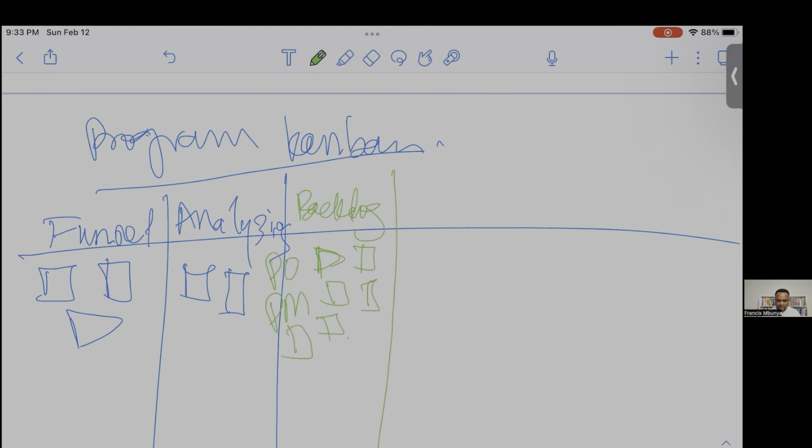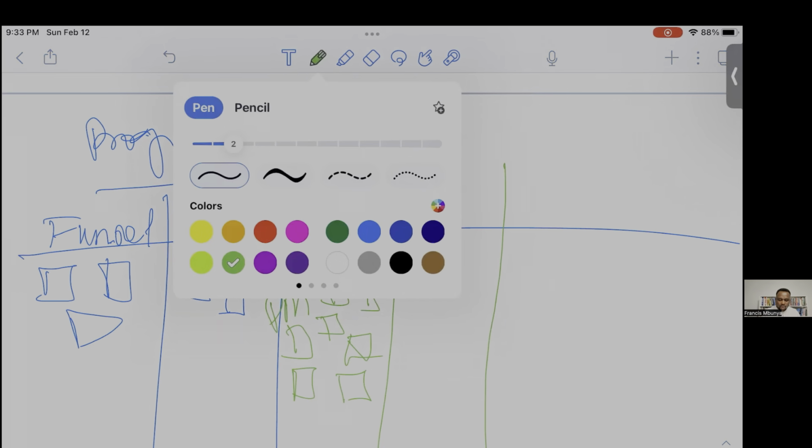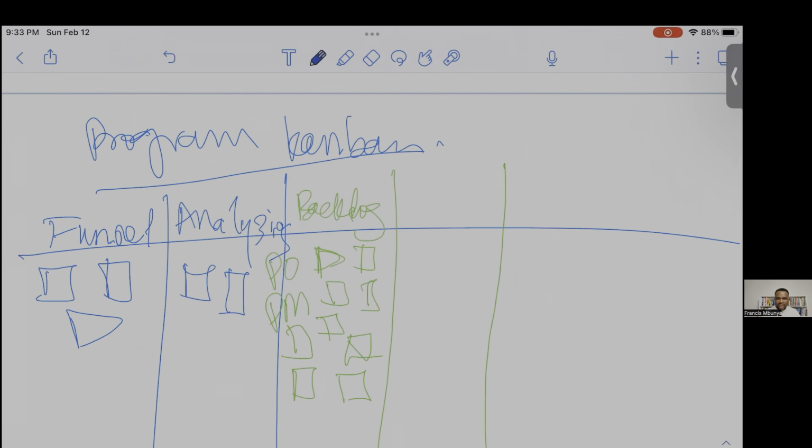So this feature can be split into several stories, which the PO does. If you're in a SAFe environment, then this feature will come to you in the PI planning and the entire team will split it. But in the Scrum environment, the PO now will split this feature and then prioritize them. Now, when all of these are prioritized, there's a next phase at the program level. I'm giving you how the Kanban board at the program level will look like. At the program level, you also have a Kanban board called implementation.